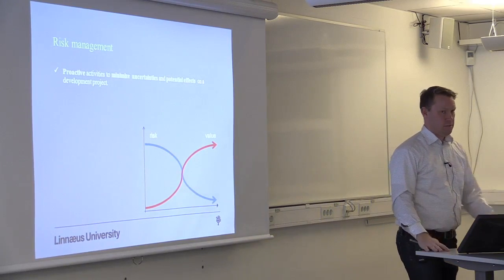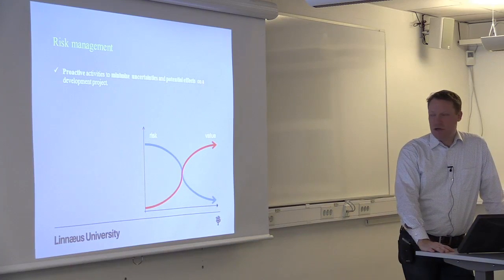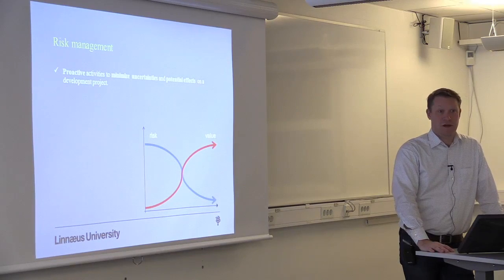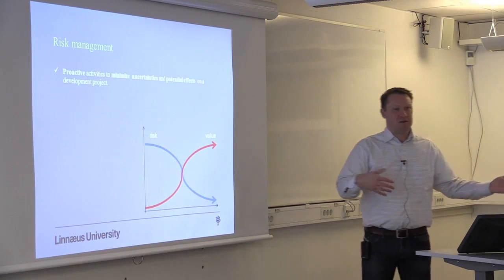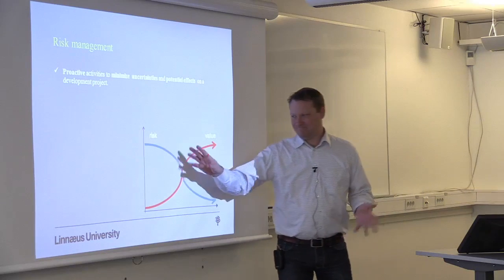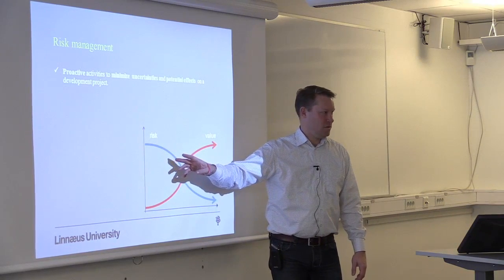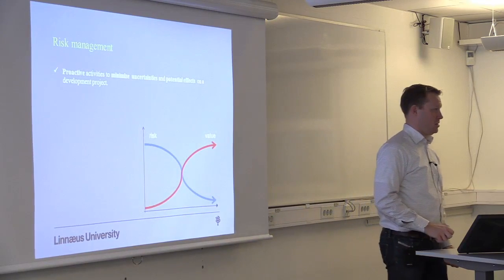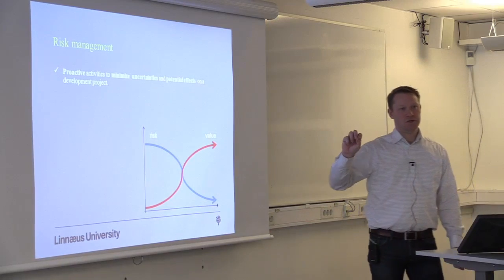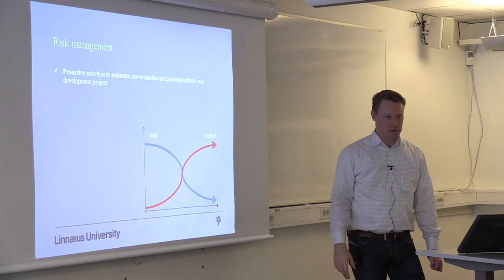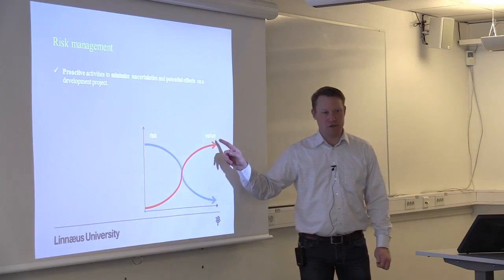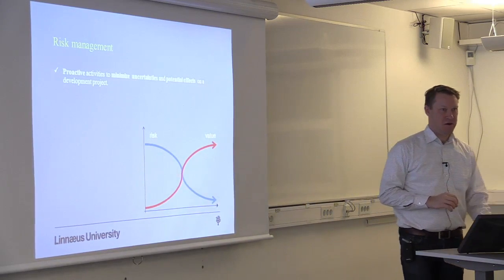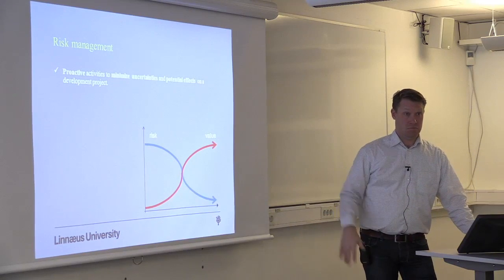You know, change your color schemes, include avatars and stuff like that. Adding an avatar feature, it's not a big deal compared to having the messaging system up and running. Risk reduction before value addition. Because it doesn't matter how much value you have if the core of the application is not there, then the value is worth nothing.